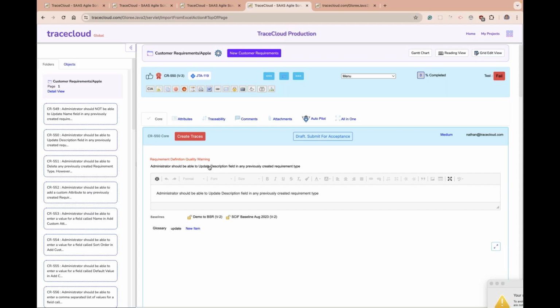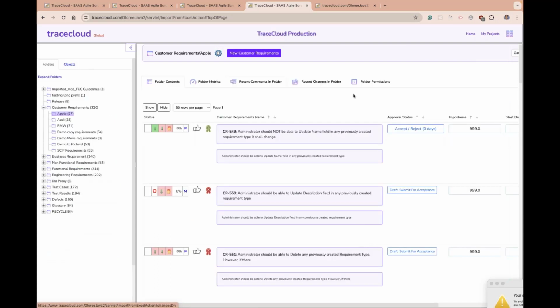And just to reiterate, when you look for a system to manage change, make sure it can let you define your requirement types. Within the requirement types, it lets you define your folders. It lets you easily import your requirements into the system. After that, you can define roles and control what members of that role can do in that folder. Then you can easily do traceability, where you can connect one requirement to another requirement to another requirement. Then you can view the data in a trace matrix format, a trace tree format.